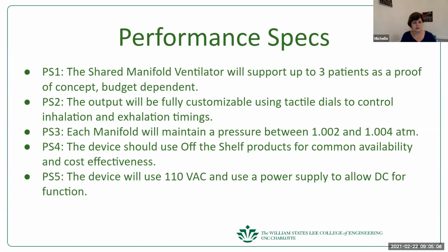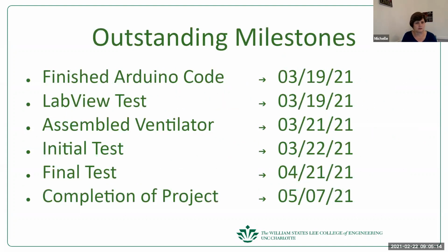Okay. Can you go back to the calendar? So are these dates, the 3/19 especially, because that's almost a month away. February is a short month, but still, what needs to be done between now and then? What are we waiting on? What's the long lead item? Does it really take you 4 weeks to finish the code? Because it looks like you've got a lot done, and LabVIEW as well.